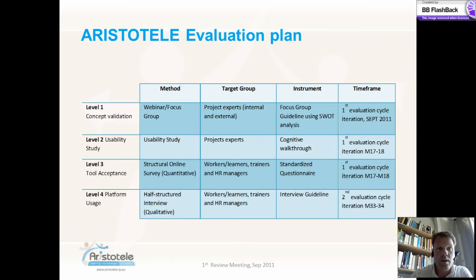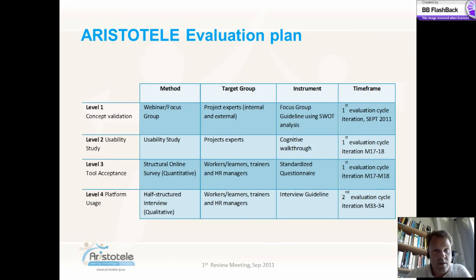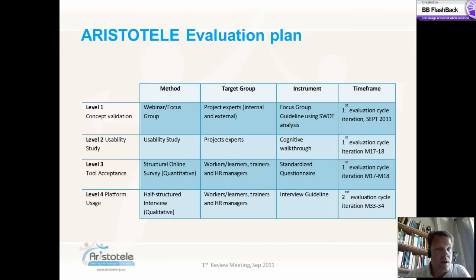The Aristotle evaluation plan foresees four levels: concept validation, usability study, tool acceptance and platform usage. Each defined method focuses on a defined target group, has a structured instrument presented in deliverable 9.1, and has a defined time frame. We are working with a multitude of evaluation methodologies coming from different disciplines, being in parts quantitative and in parts qualitative.